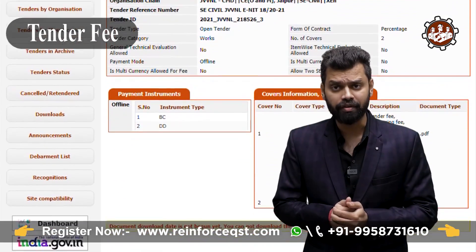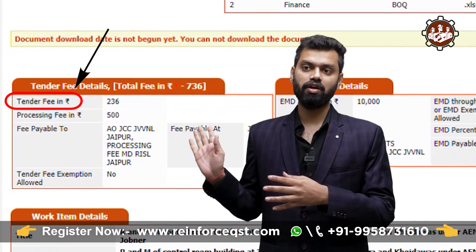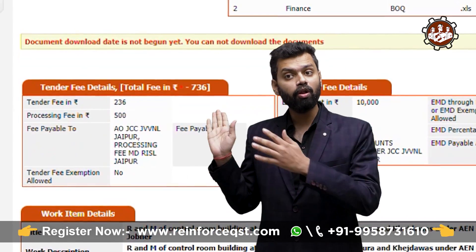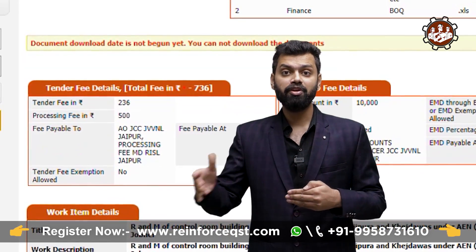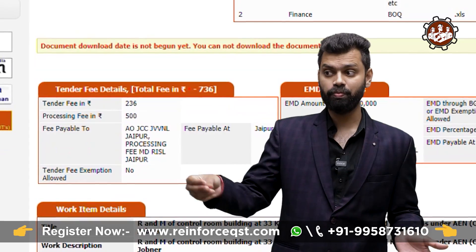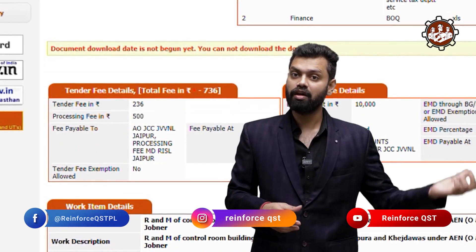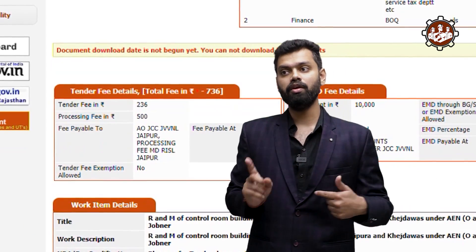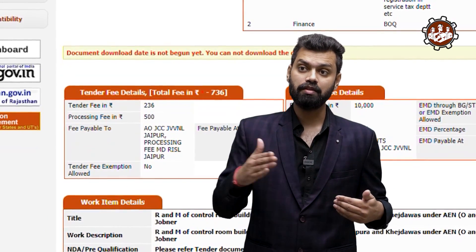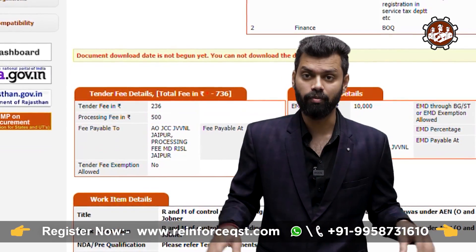Tender fee: whenever you participate in bidding as a contractor, every interested and eligible contractor — suppose there are 50 — must submit the tender fee. It is similar to an examination fee when participating in a competitive exam: it is non-refundable whether you pass or fail. Similarly, in the construction industry, the tender fee is non-refundable whether you get the project or not.